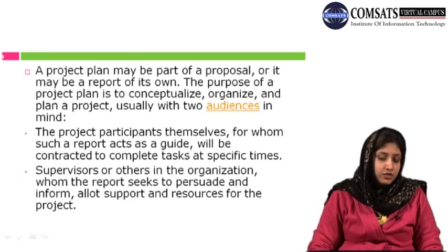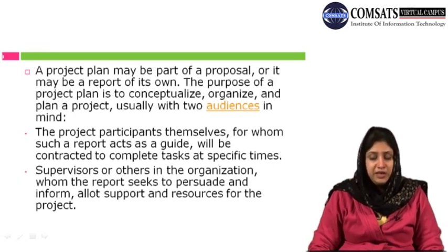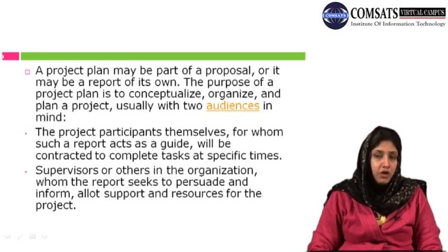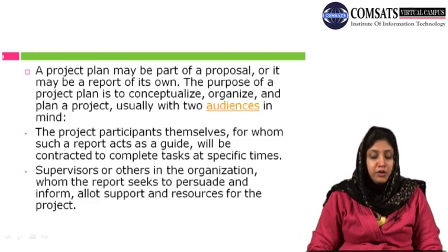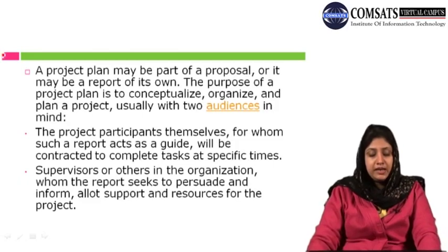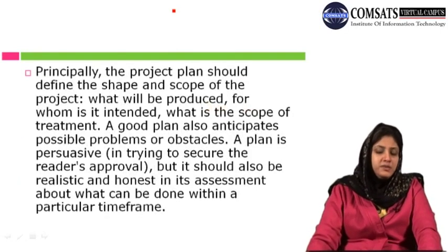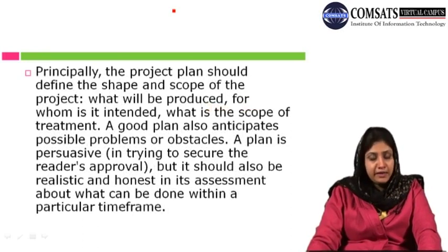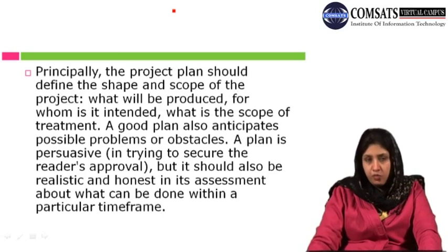The purpose of a project plan is to conceptualize, organize, and plan a project, usually with 2 audiences in mind. The project participants themselves, for whom such a report acts as a guide, will be contracted to complete tasks at specific times. And supervisors or others in the organization, whom the report seeks to persuade and inform, allot support and resources for the project. So, principally, the project plan should define the shape and scope of the project: what will be produced, for whom it is intended, and what is the scope of treatment.